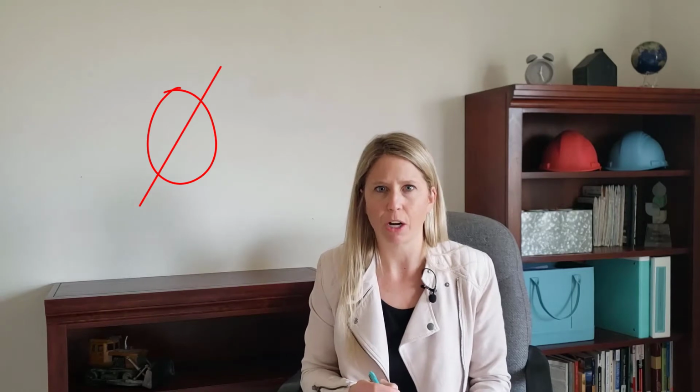So it is a very direct and simple way to communicate any changes in alignment and vision to the entire project team. It is unrealistic to not expect any RFIs on a project, and I actually do not encourage this because it's simply a formal way of communicating on a project. If at the beginning of the project, as a team, we're shooting for 0 RFIs, there might be questions that go unasked just for the sake of shooting for 0 RFIs. RFIs aren't a bad thing. Again, it's just formal communication and a very easy way to mass communicate this to the rest of the project team.